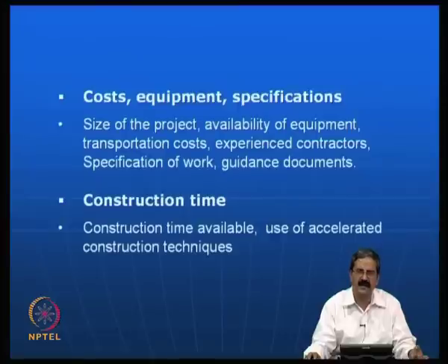There are many people in this business, and all should understand the principles of the ground improvement techniques and also how it should work in a given situation, and discuss thoroughly. So, the guidance documents will help you a great deal, otherwise there will be a lot of conflicts between the owner and the contractor and the supplier and the actual installer, which leads to project delays, which is again a problem. So, one needs to have good guidance documents.